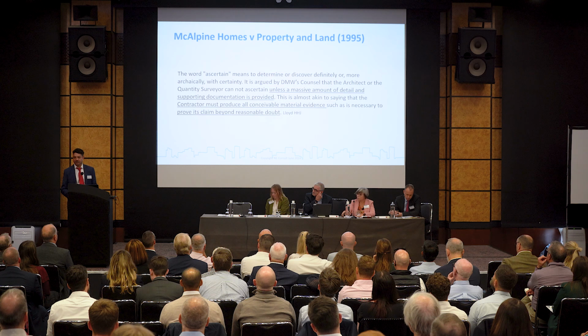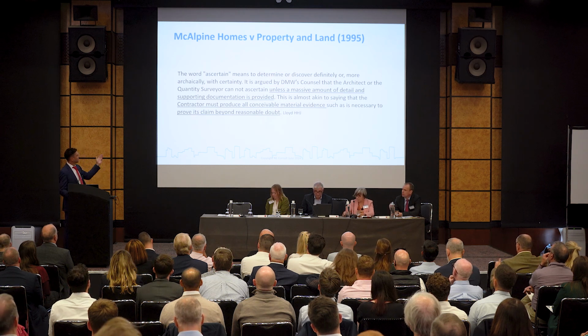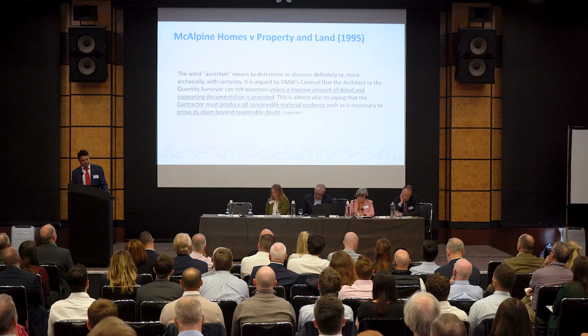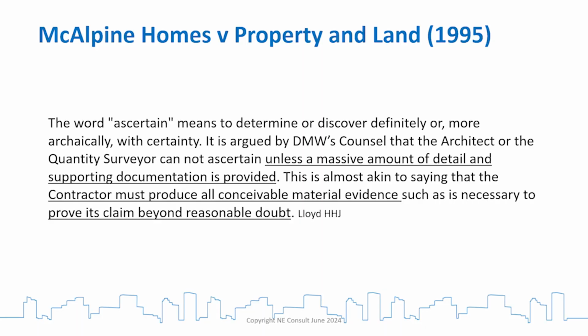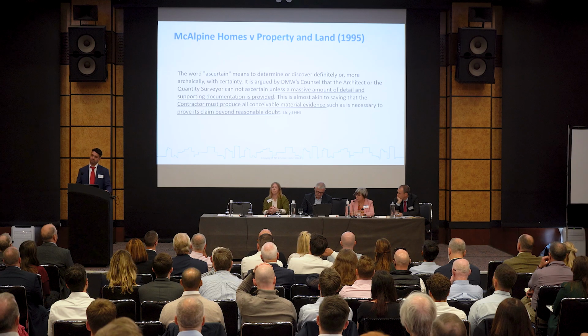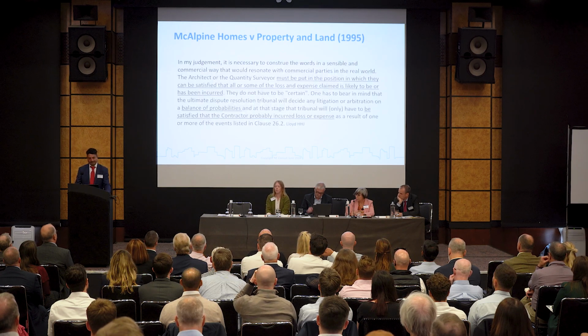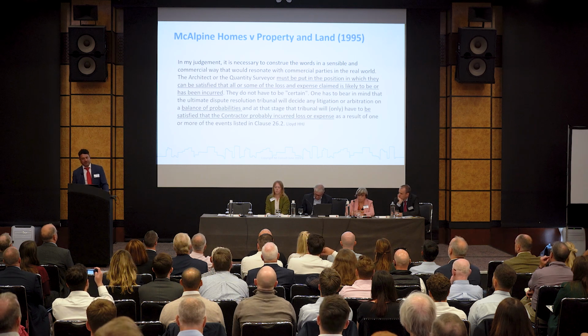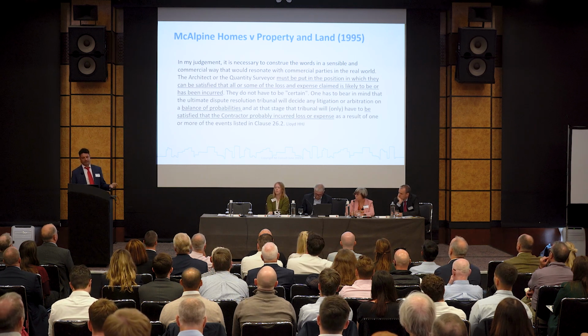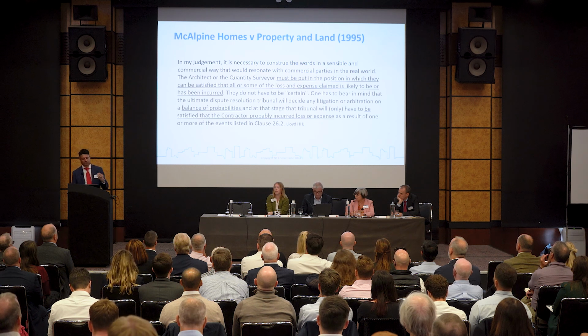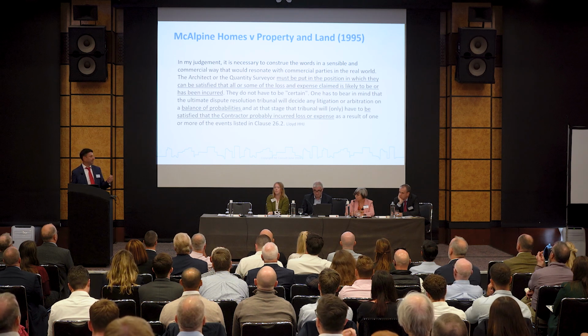What's the expression? For the want of a nail, the war was lost, or the battle was lost. So, this time we have a position where the quantity surveyor cannot ascertain, as a JCT contract requires, unless a massive amount of detail and supporting documentation is provided. It says it's almost akin to saying the contractor must produce all conceivable material evidence necessary to prove its claim beyond all reasonable doubt. But it goes on to clarify that no, you just have to be satisfied that some or all of the loss expense claimed is likely to be or has been incurred.